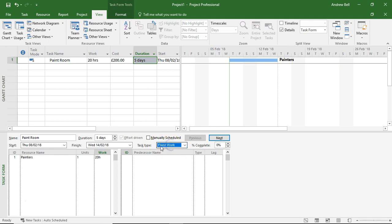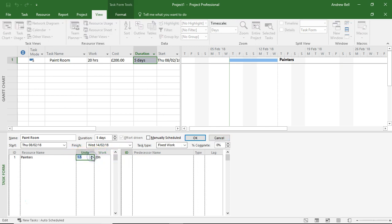So if I fix the work here, the work is fixed. If I change the number of resources on the task, let's increase that to two, the computer will change the duration.